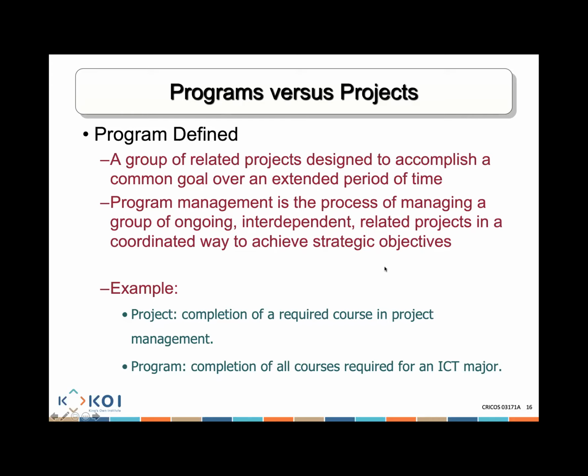So the program is basically the process of managing a group of ongoing, interdependent and related projects in a coordinated way for me to get the right outcomes. In IT, I might have 3 interrelated projects, one related to the hardware, one related to the software, and one related to the actual networking. You might say, I have the best software in the world. Okay, great. I've done the software, but the software is not really going to work unless I have the hardware. So you have a hardware project that is really related to the software project.